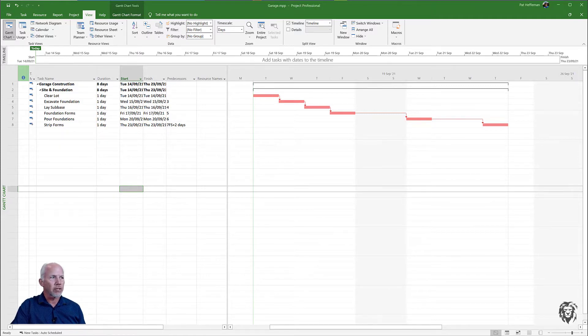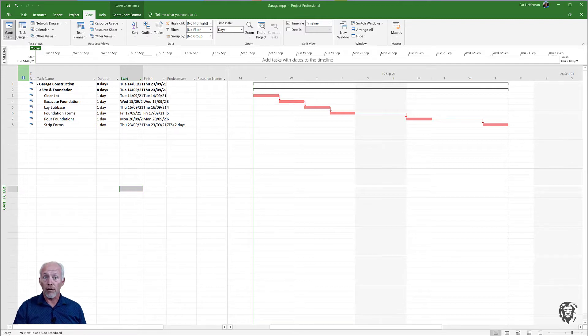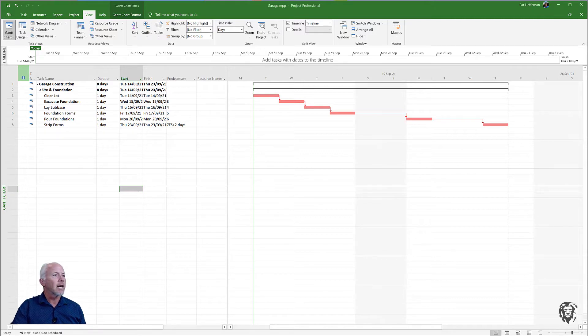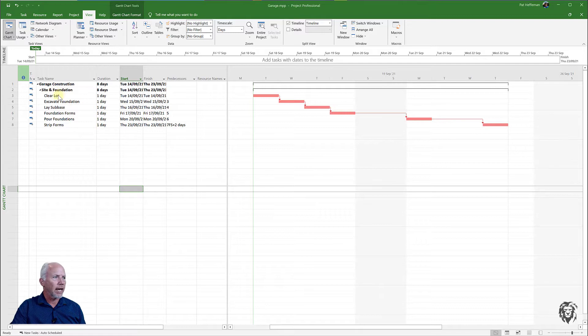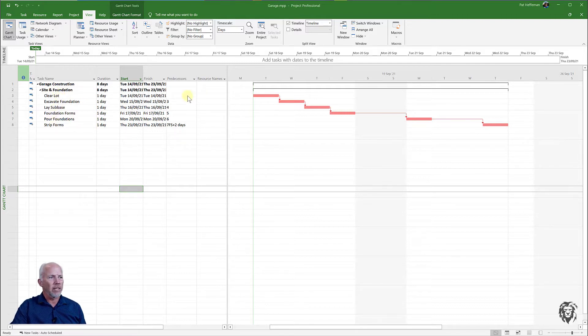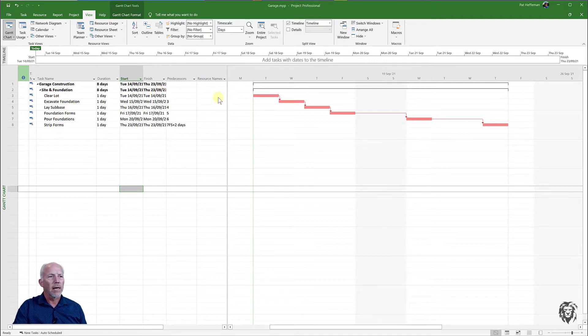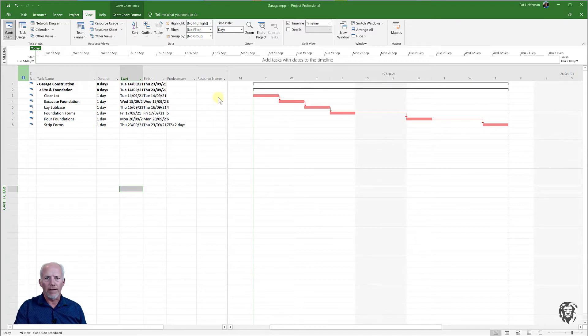The one that's open on the screen right now is for a garage construction and I've got the first handful of tasks that deal with site clearance and excavation for the foundation. I put in some durations and you can see they're all critical because I've only got one line of tasks in this particular project.